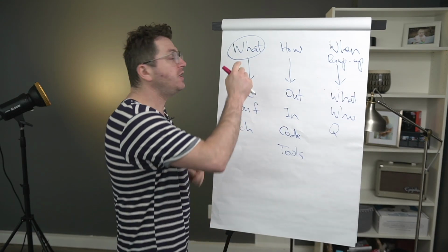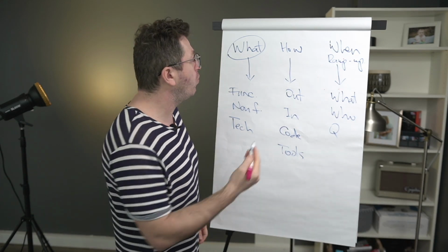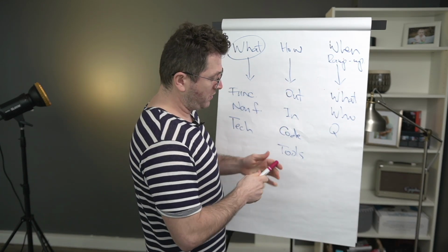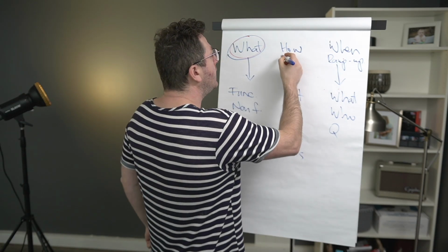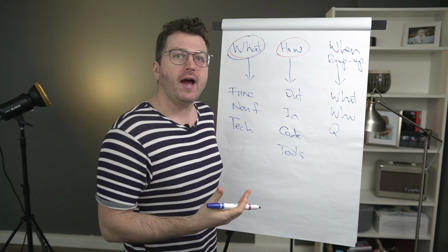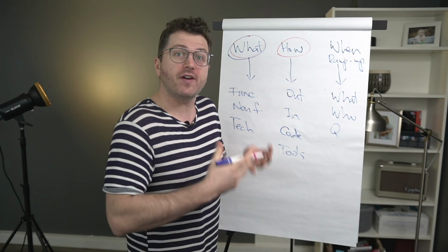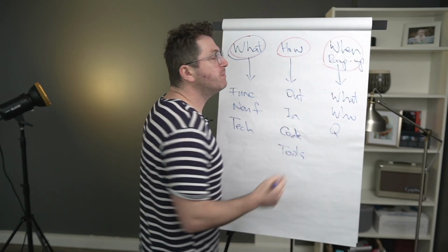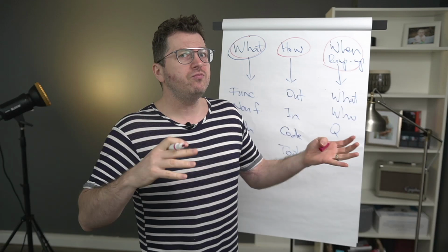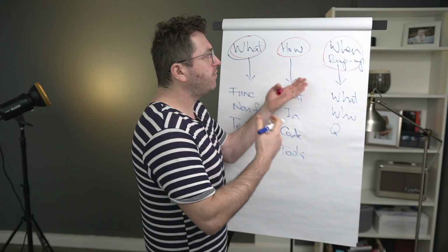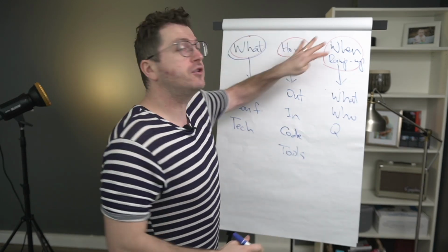First thing, you need to cover what is being built. What has the developer been doing for a while? So what is being built, the scope of work. The second one, I'll put this in red here, is how has the development actually happened? How did he used to work? What was the process of developing? And the third one is when is a new developer going to be ramped up, and what is the process of ramping up a new developer on any of these 2 items from here. You have to document all 3 of them.